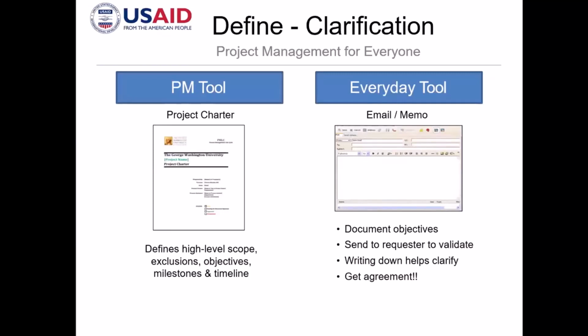The project charter is something that the stakeholders, if they see this document, will authorize that the project is already valid and legitimate, and you can start with the project. So normally this is circulated around as a memo and an email notifying everybody that the project is already alive. And we already have an agreement on the scope, high level scope, objectives, milestones, and timelines.